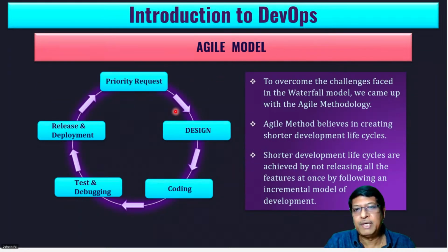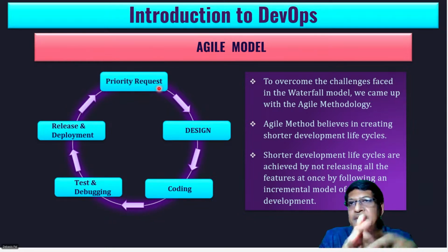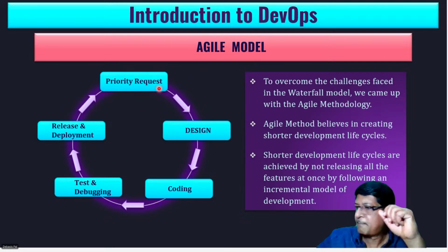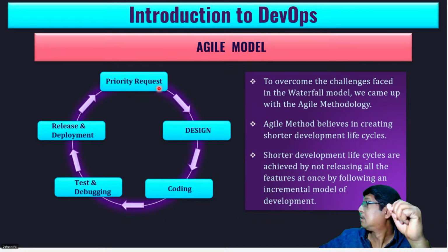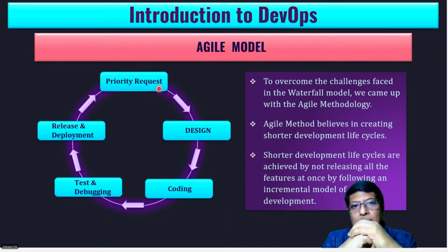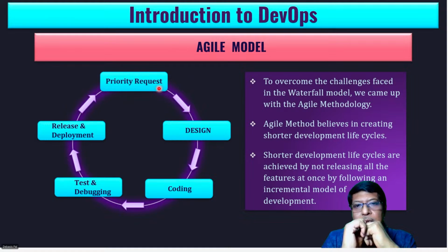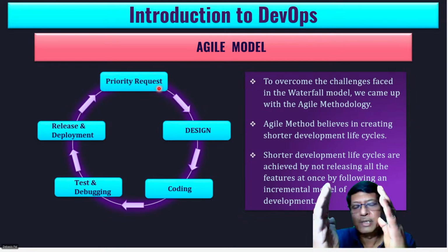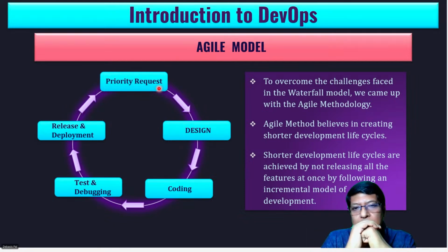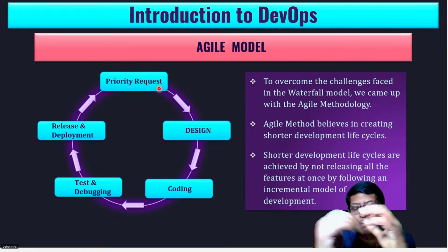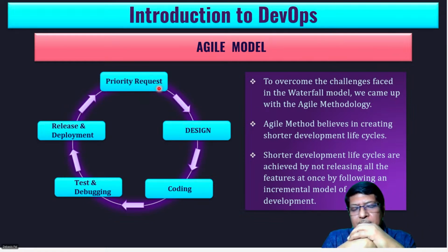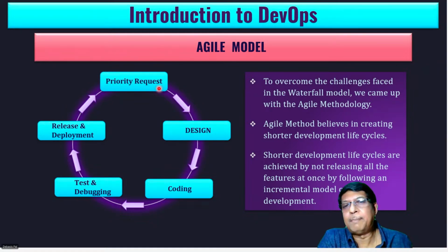So you must fail in the prioritization of requirements. You are creating a backlog. You study the market. The business owner will tell you, these are my first 5 important requirements. These are having business value. So if you can deliver me these 5 features in the first month, in an agile sprint, a 1 month sprint, a 4-week sprint, then I am very happy.